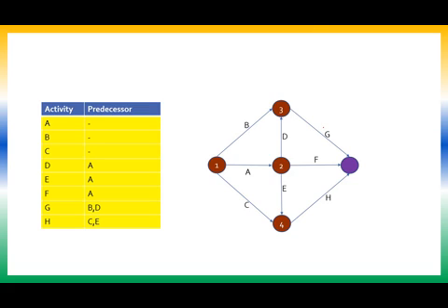Now delete the lines from 3. Did I get any new start node? No. This line was also deleted earlier, but still there is one more incoming node here. So next, from the numbered node 4, delete the activity. Now this becomes a new start node, which is your terminal node. So what is the next number that I am supposed to give? The node number will be 5. So this is how network construction has to be done. Isn't the problem simple?